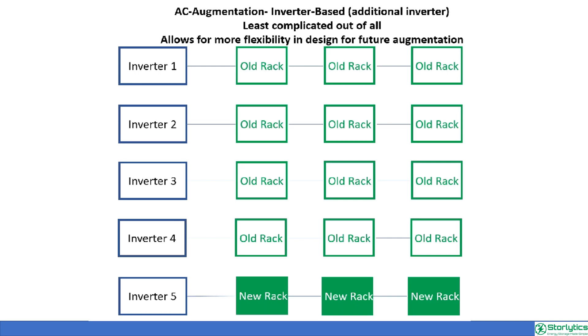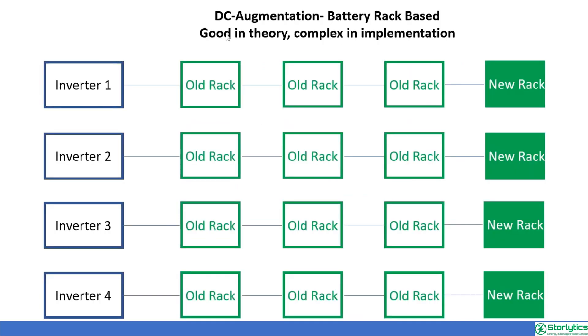It is the easier and more reliable way to increase project capacity steadily over time. This is based on several factors: Point number one, no additional devices required like DC to DC converters to manage voltage levels between newer and older battery racks. Point number two, BMS control strategy disparity. And point number three, the different internal resistance causes the newer racks to have different charge discharge behavior.